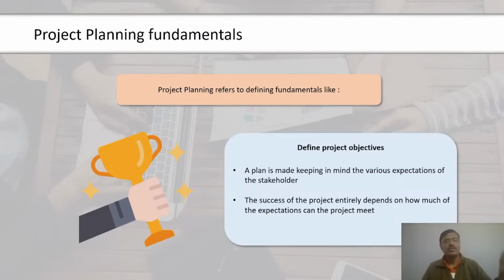In the next screen, let us discuss more on project life cycle. A life cycle is composed of phases. Each phase represents a discrete unit of work required to be done on the project. There are different ways of classifying project life cycles. Let us first discuss the sequential versus overlapping life cycle. In sequential phases, the subsequent phase starts only after the previous phase has been completed, whereas in overlapping phases, 2 or more phases may run in parallel for some time. This could help fast-tracking and compressing the amount of time required.